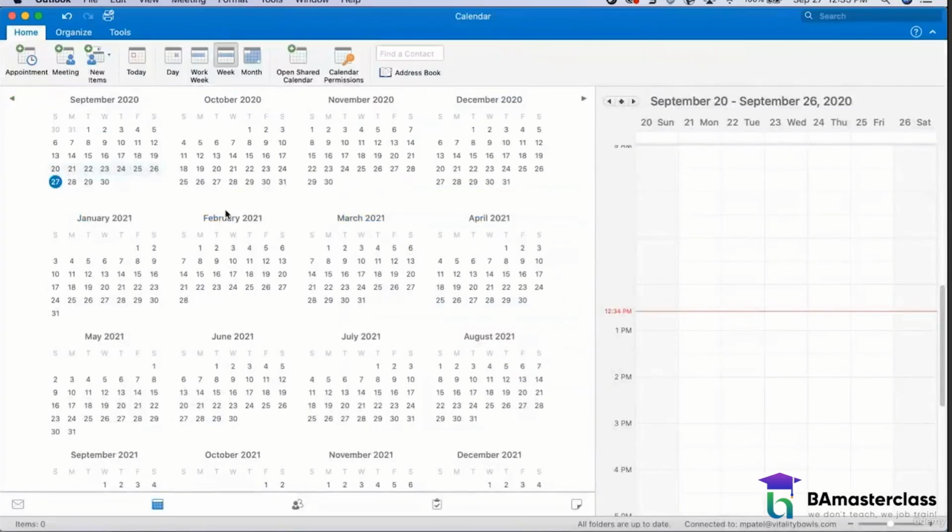All right, so let's say we are in September. Normally the best way you have your releases is on Wednesdays. That's a good release day in Agile Scrum. Why do you want to have a release on Wednesdays? Because if you have it on a Saturday or a Sunday, people have to work on weekends. You don't want to do that.